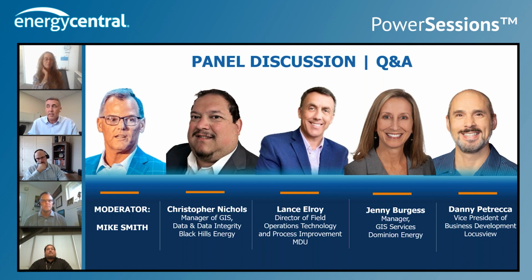They're continually asking that. I think some of the challenges around realizing the ROI is you've got to make commitment changes, partnering with the business doing their part. So sometimes there's process change involved. Sometimes there's impact to different positions throughout the company where roles may change. We had to take about 6 months towards the tail end of the gas implementation to take a hard look at roles and responsibilities across the service territory, because things change in a digital world, right?